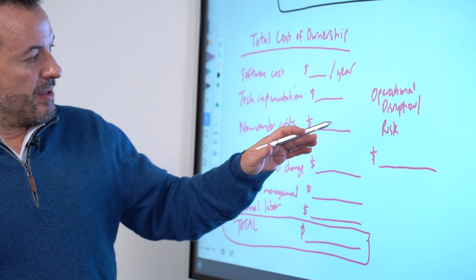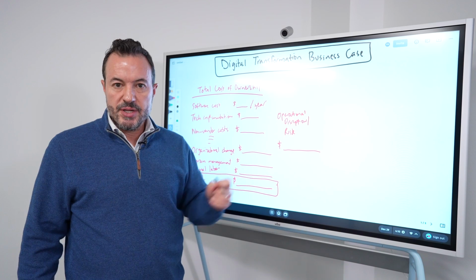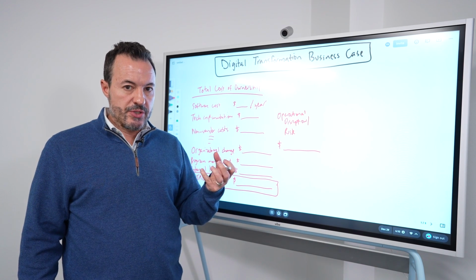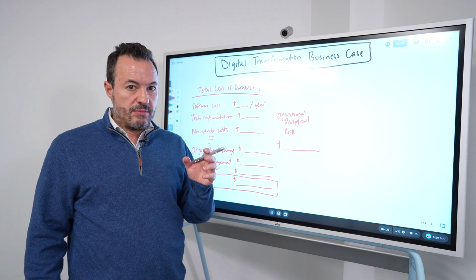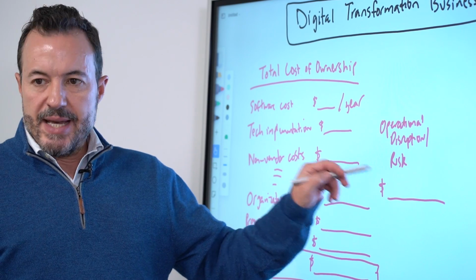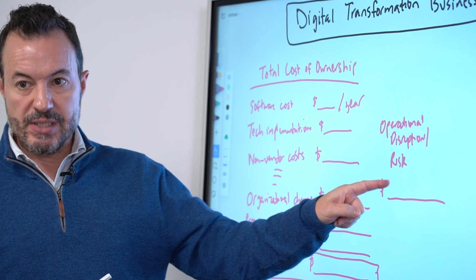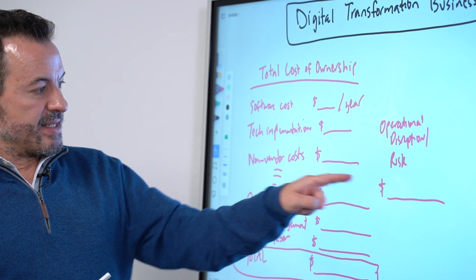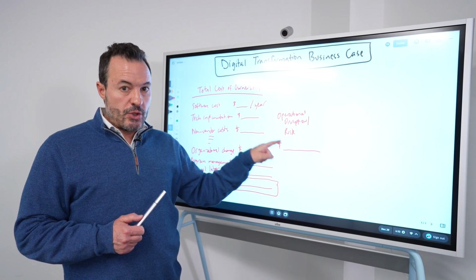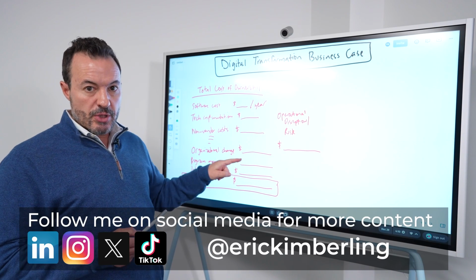If you're an organization that has a risk of potentially not being able to ship product or getting canceled orders or not being able to close the books, not being able to run payroll, what does that cost you as an organization? And if you quantify those costs, what if we can't ship product for 30 days, for example? What is that net impact to your organization? When we quantify that number, oftentimes, again, we find that that number is a lot bigger than this number here, and that tells us there's a lot of risk associated with this project. And we need to quantify this number because it could end up being that this risk becomes reality and it ends up becoming a part of the cost of the overall project.